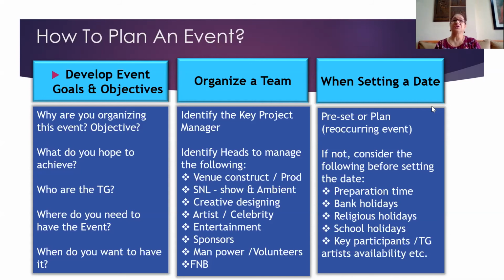Being with the sponsor during the event, asking is there anything that you'd like? No, not running behind them, but just within their sight, so they can call you and tell you something. Many clients come ahead of the event and start, oh, why is this here? I don't like it here. Can we put it there? Ideally, you should invite them the night before and take them for a round and show them that this is what we are doing. I hope everything is okay with you, so that you have enough time. If they want any changes, you can make them.